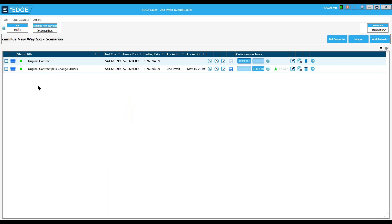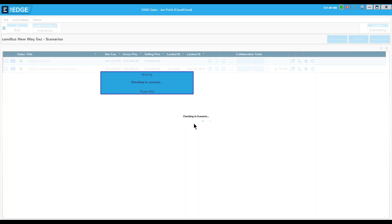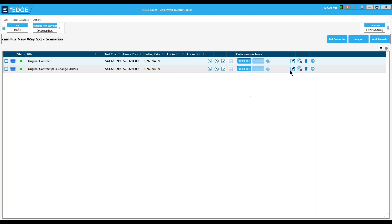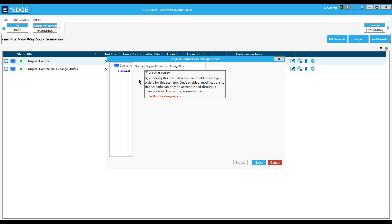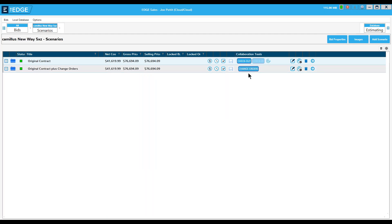There are a couple other steps I have to take before I can start using it for change orders. First, I have to make sure there are no errors in the project — this little green status window must be green and not red. I also have to have the scenario checked in, so I'll click the check-in box. The last thing is to open the scenario properties and check the 'Use Change Orders' box. It says: by checking this box you are enabling change orders for this scenario; once enabled, modifications can only be accomplished through a change order, and this setting is irreversible. I hit confirm and save.